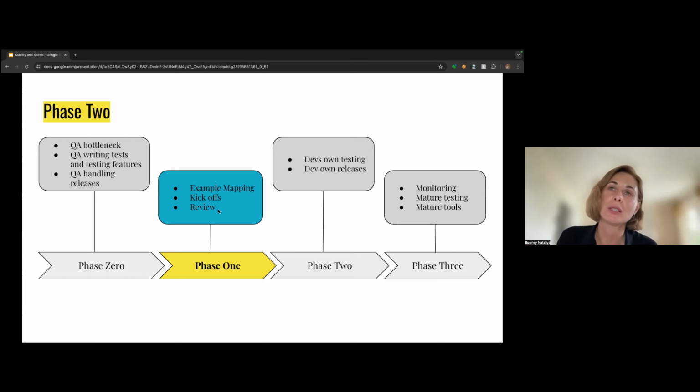We also introduced reviews. That's at the end of the process, and the review will answer the questions: have I developed and tested my feature as expected? Does it work as expected, right? You have that conversation, you look at the tests, you might have a PR review, you run a test, you add more tests if you think something is missing or you just had another idea. And once you're happy and everyone is happy, you can release.